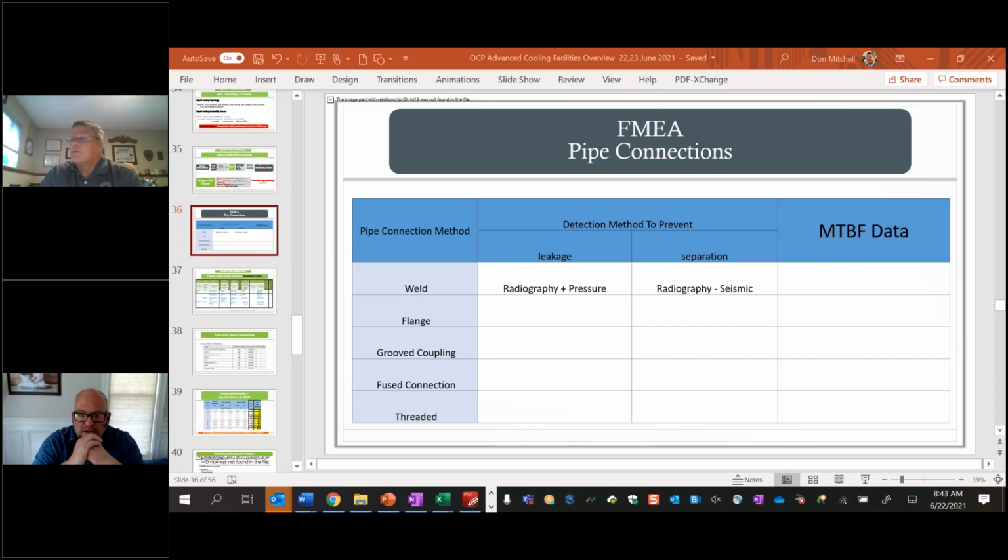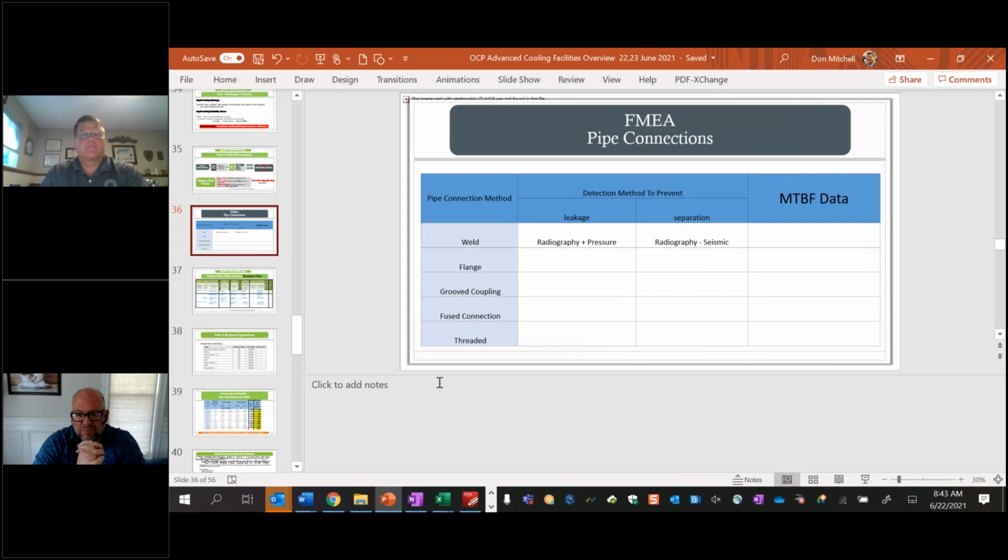It's definitely a commissioning issue, in that we would typically be comfortable with pressure on day one, depending on what the system is. If it was a refrigerant, for example, we might use a smaller molecule than the refrigerant, like hydrogen or helium, usually helium, to see if there's any seepage. But on a longer term, a weld that is just good enough can easily corrode, or be worn out by crack corrosion in the flow. So I would say no, it's definitely not as good as radiography.